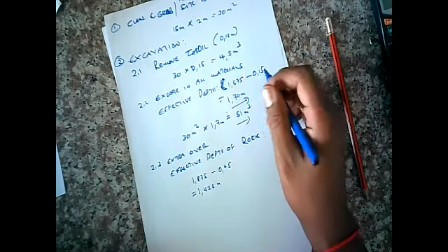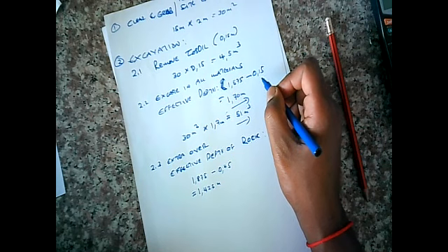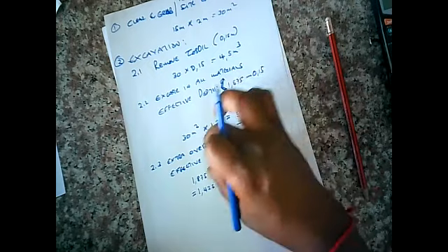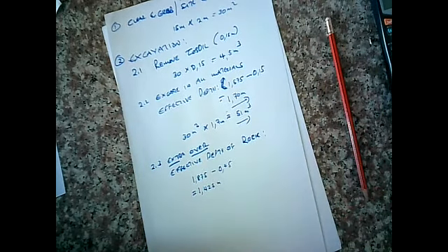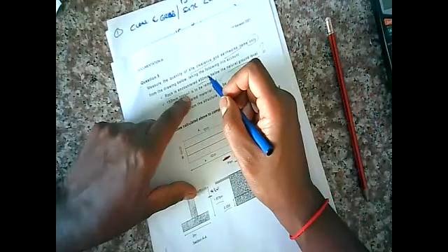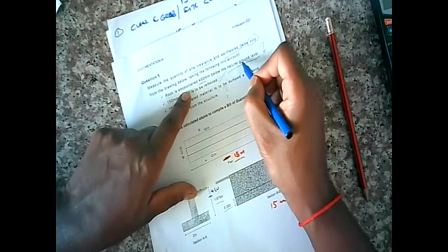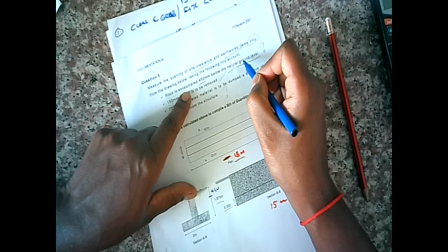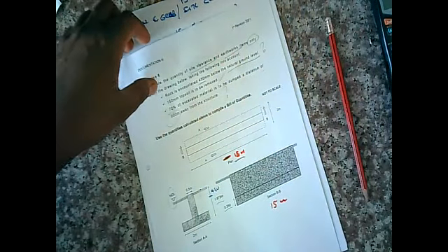Now you're going to be probably thinking, what about that? What about that? Do not confuse this calculation with this calculation. This is an extra over. Okay. And the question tells you not from below topsoil that the rock is encountered. Rock is encountered from the natural ground level. Okay, that is why we're not talking about topsoil or considering the topsoil 150 mil that we already removed.